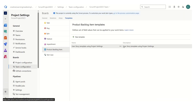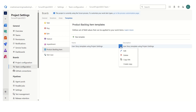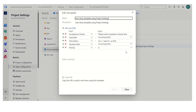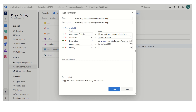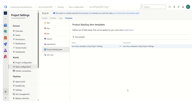Let's go back and see how we can edit this one. We simply click on it and click on edit. The reason we want to edit is because it's not taking the angular brackets format. So what we can do is in the description, we can simply mention 'As a user, I want to perform an action' — we want to have this sort of template. So we have saved it.